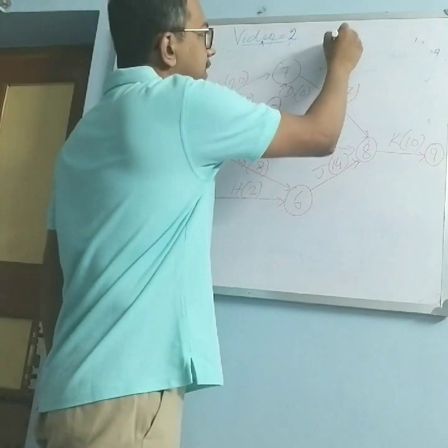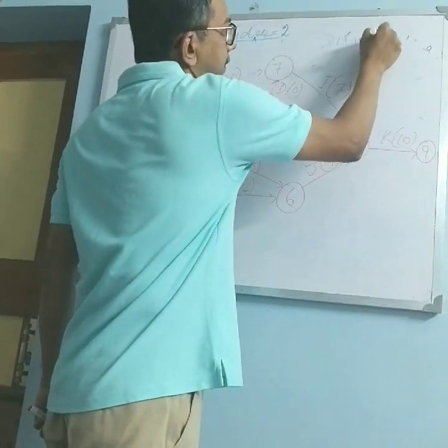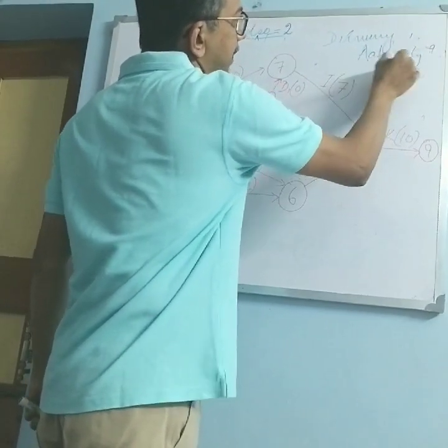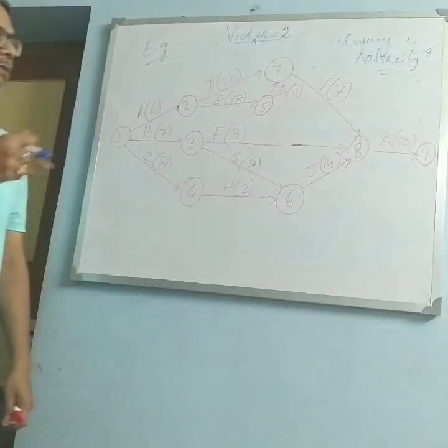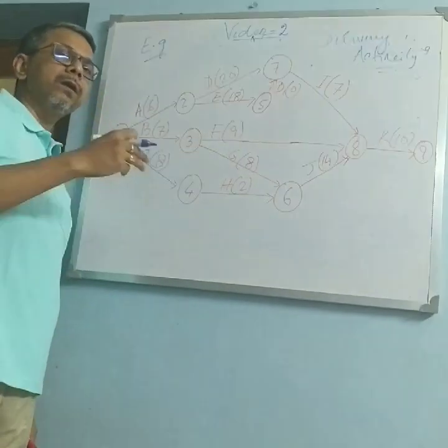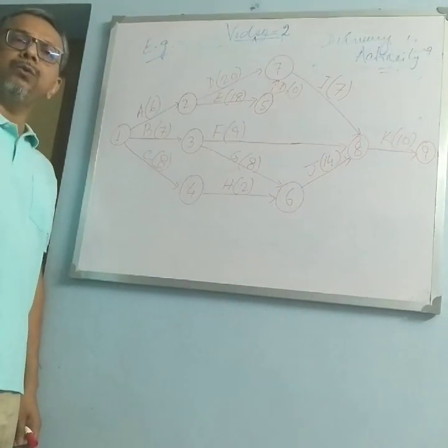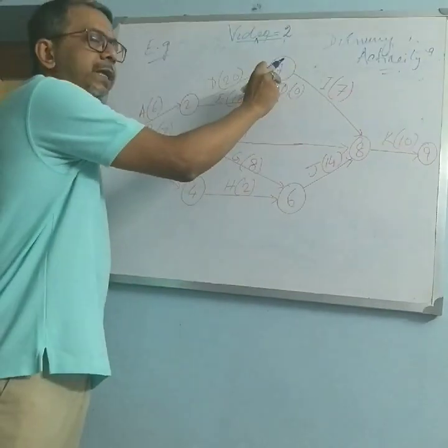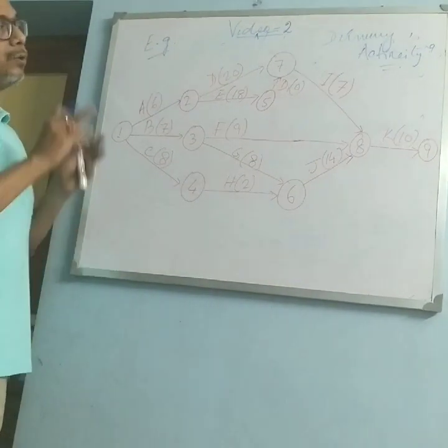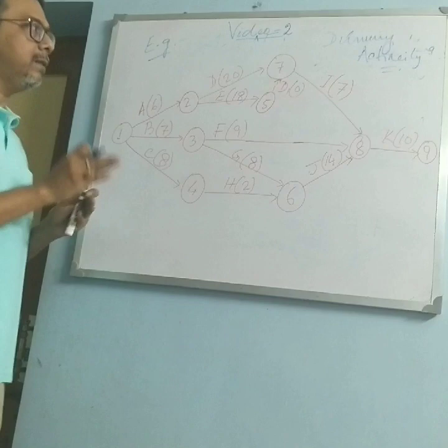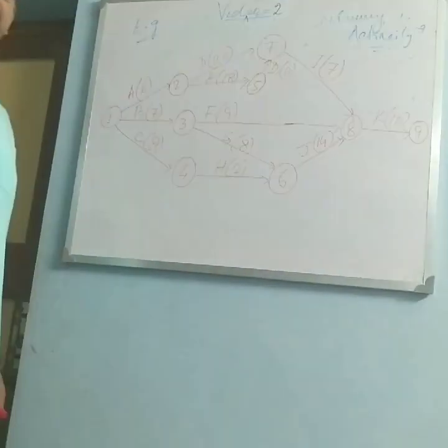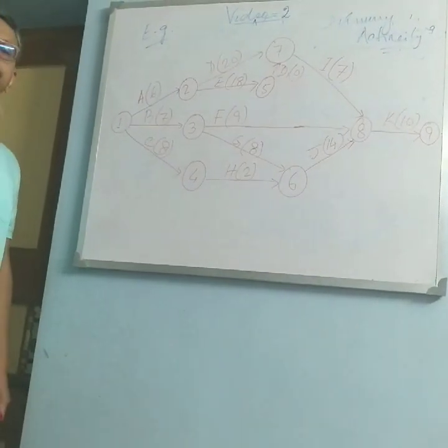Now this D1 is the concept of dummy activity. As the numbers increase, if you go for more dummies, then starting with 1, you can go on numbering, that is 2, 3, like that. But never give only D. If you give D, that will basically mean that it is an activity. But it is a dummy activity. That's why you have to give it as D1 within bracket 0. That means the entire resource for that dummy activity is 0.